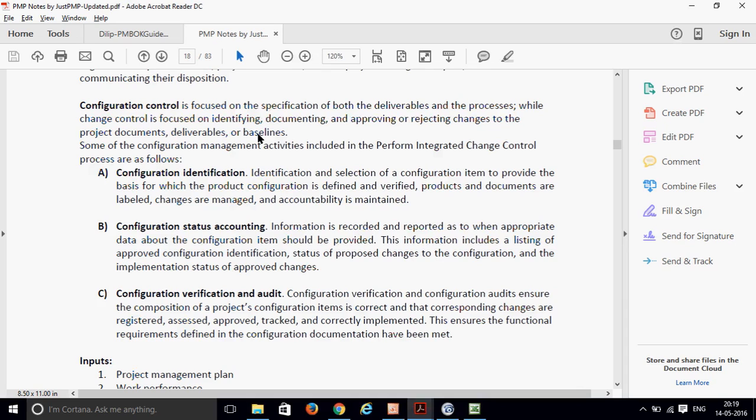That is very important. That specification becomes a configuration part, and it is noted down in the project documents. If you want to change it, you don't just accept it. It becomes a configuration change, and that needs to be taken care of through configuration control.